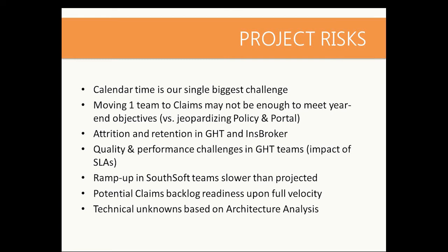I think it's more realistic to talk about the effect of team size growth in that Ballotex-like project. One of the team characteristics is what they usually say: never change a winning team. That's for a reason. Changing a winning team gives a disruption, and people need to work out their team agreements, their standards again. That doesn't have to be a huge deal, but it's definitely costing you some performance.